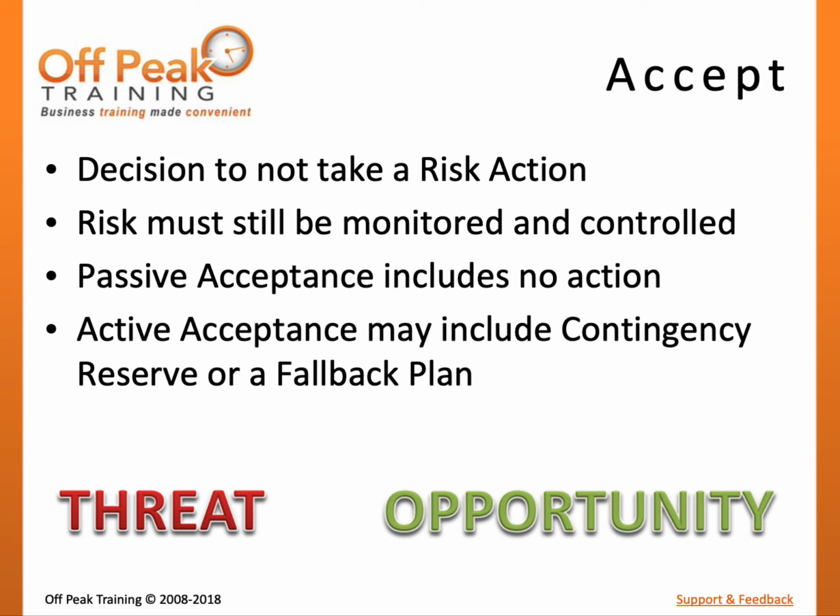For some risks, opportunities, and threats, it may be nearly impossible to implement one of the responses described earlier, or not cost-effective to do so. In these cases, the project team may choose to simply accept the risk. Risk acceptance is when the project decides not to take any immediate action as a result of the project risk. A passive risk acceptance would be to document that the risk has been accepted and follow any monitoring and controlling procedures that may be described by the risk management plan. A more active risk acceptance may result in the establishment of a contingency reserve or a fallback plan.